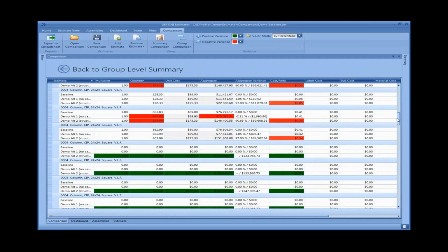So they sort of went into problem-solving mode, and they teamed the curtain wall manufacturer with the precaster and came up with creative ways, putting the embeds in the precast panel, of reducing the unit price. So in their second estimate, the unit price went down. In the third estimate, the quantity of curtain wall went up.